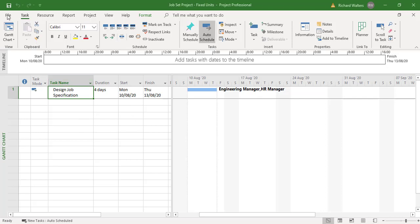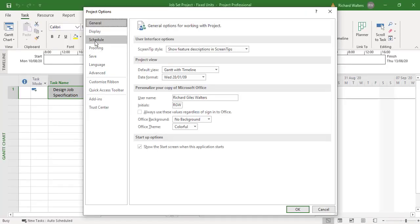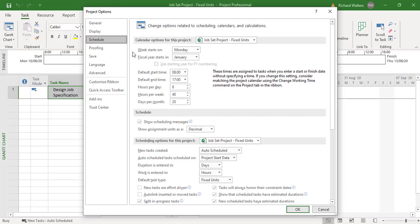We can see this through File Options. Go to File Options and go to Schedule. Under the default task type, the default type is fixed units. What this is saying is if you add a resource to a task the units are fixed, and if you decrease the units the time will increase.